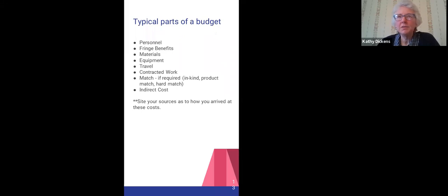Thank you, Nancy. I'm just going to do a quick overview of the rundown typically of a federal grant. One of the things I'll draw your attention to is that sometimes it's clear from the grantor that they won't cover certain things. Our community foundation, for example, will very seldom cover the cost of labor in a project. If a project is $25,000 and $8,000 of that is staff, they're going to really question it and possibly take that $8,000 right off the project. So you really have to look at your grantor when you are looking at your budget.